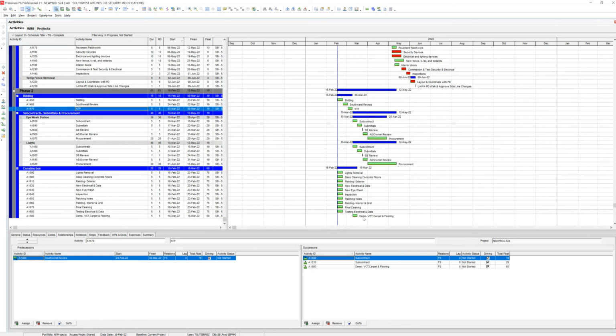So now you see the demo. Remember I tied it to NTP. But in reality, what do you think we're forgetting? No. Well, safe off too. Who's doing the demo? Can they start as soon as we get NTP and say demo go? No, we got to contract them. We got to do the same thing. So even though we're not tracking them for procurement purposes, we're tracking them for contract purposes.